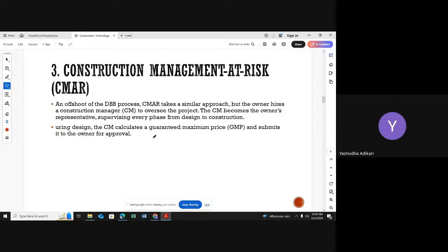Now, imagine this is my design company and this is my construction company. I told you they have no interconnection between these two. Now I am introducing a construction manager. This construction manager is overlooking between these two companies. He or she is the one doing this interconnection activity. Actually, it is supporting us to minimize some disadvantages that I mentioned in my last discussion, that there is no interconnection between the two parties. But now here, there is a person as construction manager. That person is supporting us to maintain the interconnection.